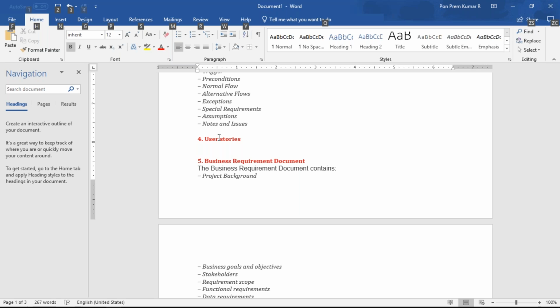See, before writing user stories, normally you write a document for what's the name? I forget. Epic. See, an Epic is the requirement given by the client. You have to break down the work into user stories. For example, just assume that I'm a client. I have a requirement of developing an e-commerce platform for the products which I own. For example, I may be running an automobile company. I intend to start an e-commerce company where the website will be selling automobile parts. So this is the requirement given to you.